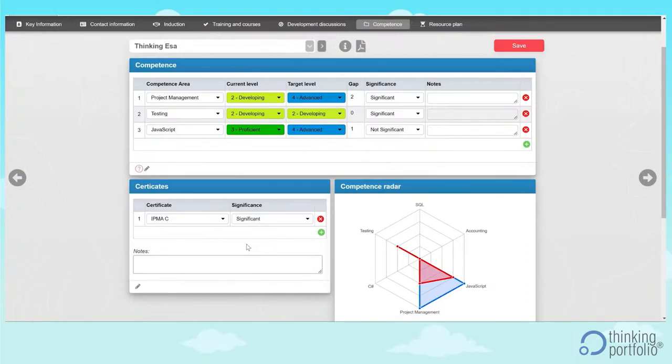And one thing here is that I can say that this person has a skill of project management, for example, or has the skills to be a program manager. So in the resource plan, what will happen once this skill tracking is activated is that it will only show me those resources for the task that have a knowledge of project management or program management or testing.